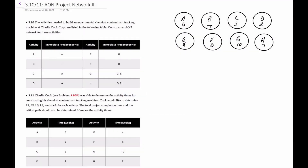Hello there. In this video I'll demonstrate how to draw an activity on node or AON project network and also to determine what the earliest start and finish times and the latest start and finish times are, as well as identifying any slack and what the critical path is. This example is based on problems 3.10 and 3.11 in your text, combined into one video. We have eight tasks ranging from activity A through H, with predecessor relationships and completion times in weeks. Our first objective is to construct an AON network for these activities.